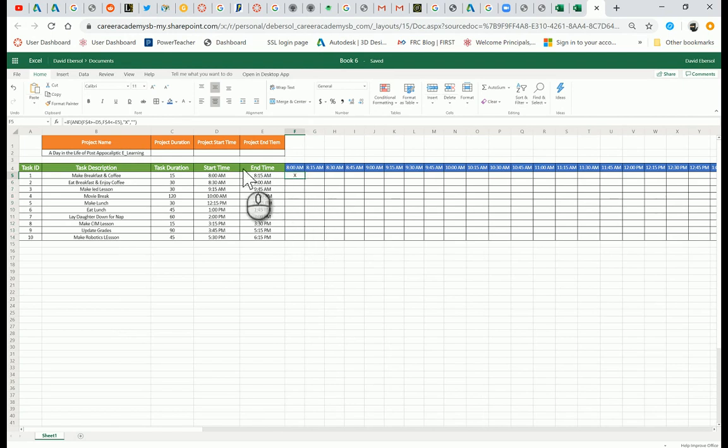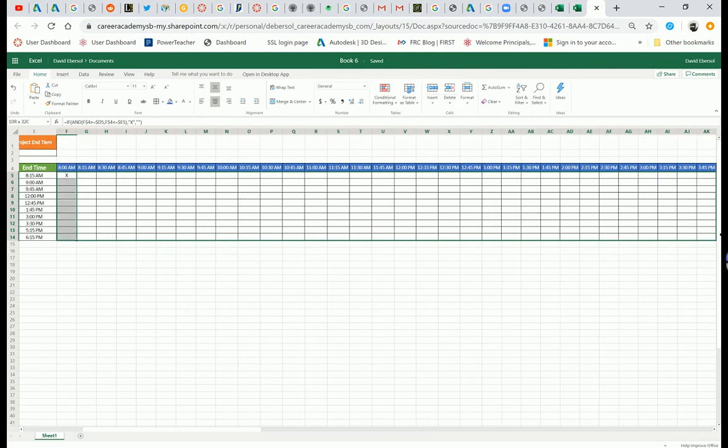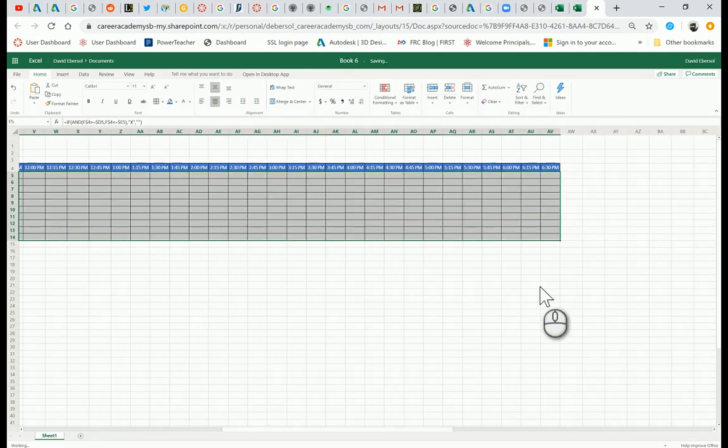But I'm not quite done yet, because I also have to lock these columns. I'm sorry, row 4. Now I need to lock these columns. When I move down the row, I don't want these columns getting off of the row. So I'm going to come here. I'm also going to lock column D and column E. I don't ever want those to move either. So now, since I locked those with the $ sign, everything else will move with the reference and populate my chart. Boom.